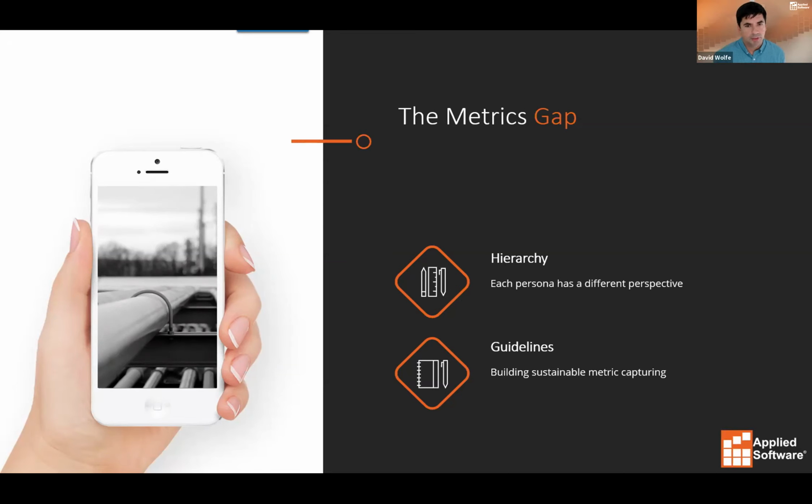It is very important, like Owen was saying, with the spec example, let's say, for example, sometimes we approach that in a linear fashion. So if you got a set of new specs, you might say, for this project, it's going to take 3 weeks for us to build these specs in-house. And if that starts happening consistently, then all of your projects are behind and you're losing 3 weeks off your schedule. Whereas if, as a business, you can take an approach and say, all right, we're going to really put a priority on having specs disconnected from our project process.